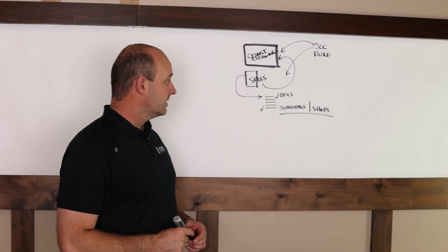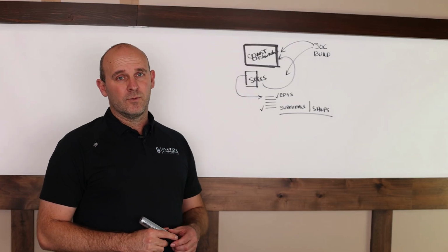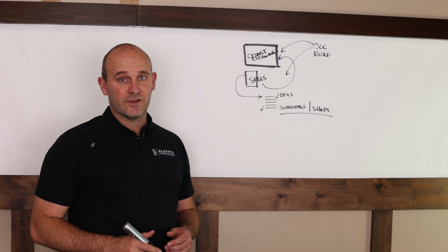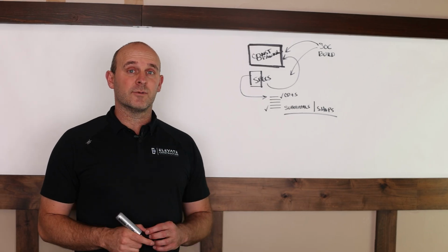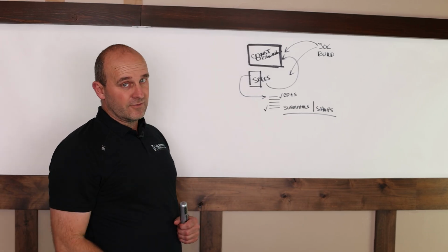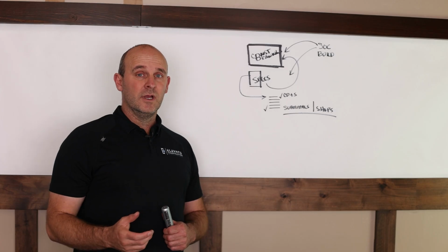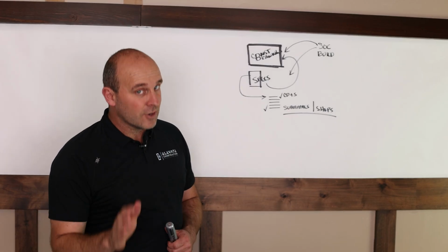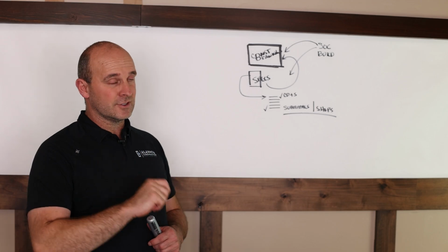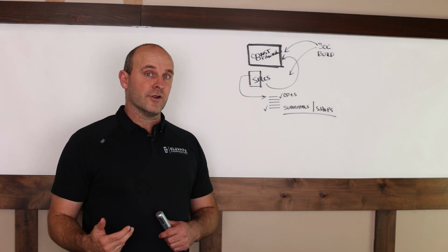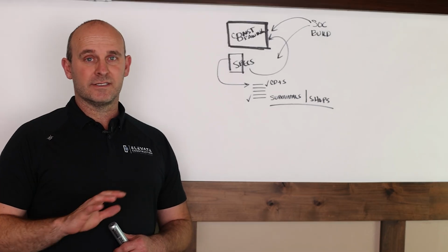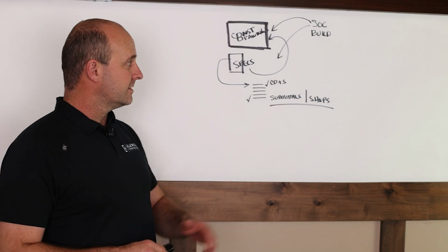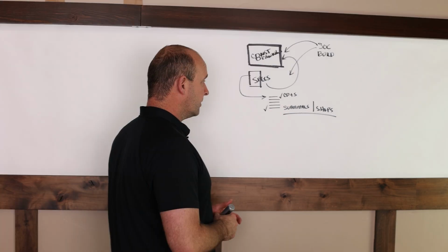I also have some other examples from working in what used to be called OSHPD in California. I remember the shop drawing showed a 4x4 post attached to a masonry wall, and the clips were at 3 feet on center. The drawing showed 4 feet on center, so the shop drawings were actually better, but OSHPD rejected it and said, hey, you have to do the 4 feet on center because that's what's required on the contract documents.